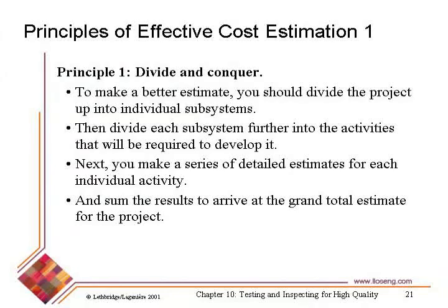If we're doing it in layers, it's how much time will the database layer take, how much time will the functional layer, how much time will the user interface take, how much time will the testing take, how much time will the deployment take. Add all these times up, but the key is to estimate each one individually. You can't just do a big bulk estimate. You've got to break it down into smaller and smaller components where you can realistically get an understanding of how much each one will take.